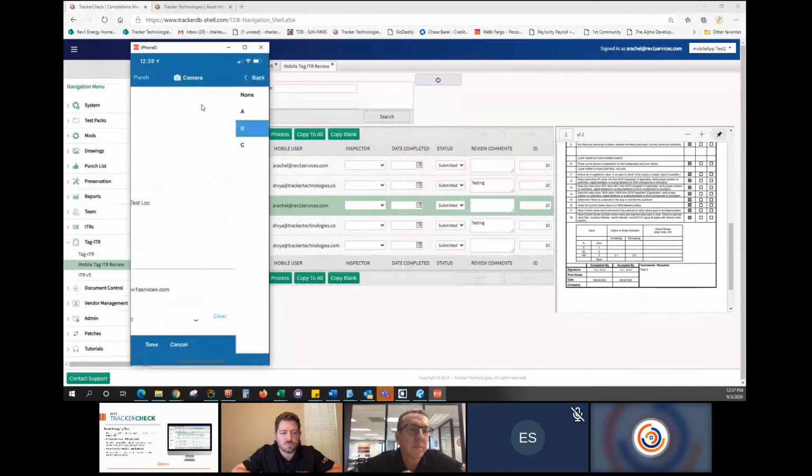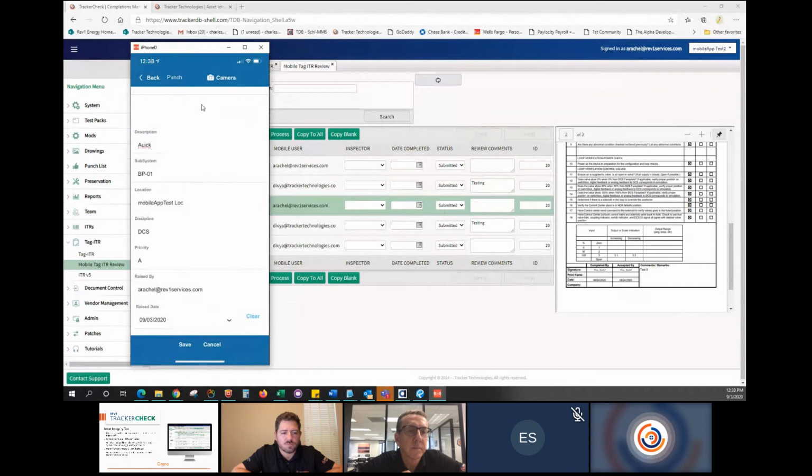Call that one DCS, priority, we'll call that one an A. Now, just because I'm assigning these, really all you need is a description and a raise by date. Everything else is supplemental for the field guys to enter. You can review these and assign these just like you normally would when they come back in from the field. You can also reject these and send them back out to the mobile app.